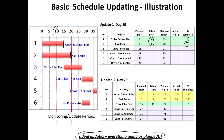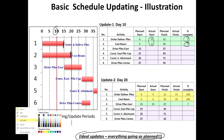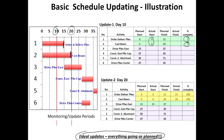Now I move on to the second update, which is on day 20. By the 20th day, if I look at my schedule, activities 1 and 2 should have been completed. I can now enter 100 percent complete, because they have been completed. In the earlier phase I was not able to enter a percentage complete because they were halfway through. Once completed, it is easy to enter. And of course, if an activity has not started it is also easy to enter 0.